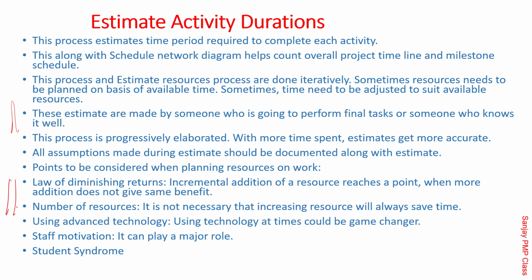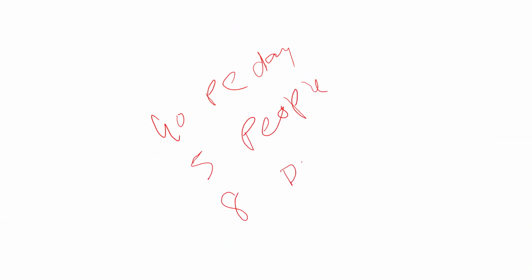If it was a work of 40 person-days, okay, 5 people, and they were going to complete in 8 days. This was that initial formula. The sponsor comes back and says, I will give you 6 people. How many days will you take? Probably 40 divided by 6, so 6.5 days. Instead of 8, 6.5 days.